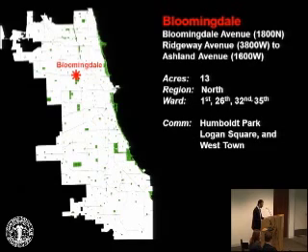$3,087,908.89 plus a reimbursable expense allowance of $844,954 comprise a total contract award not to exceed $3,932,863.14. The contract period is 1 year, initial term with 2 additional 1-year extension options. This covers our initial design and then gets us through the construction observation phases as well. There's a 29.4% minority-owned participation and a 12.9% women-owned participation for the contract.